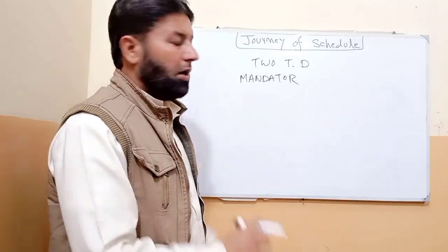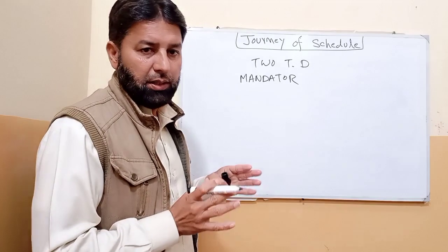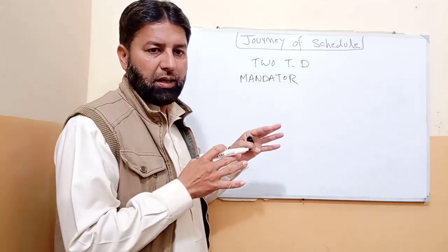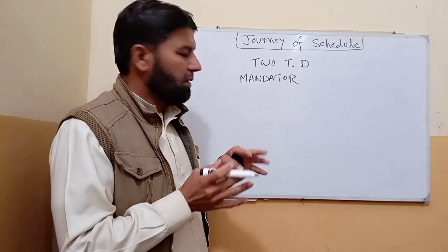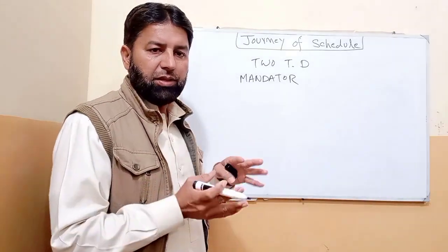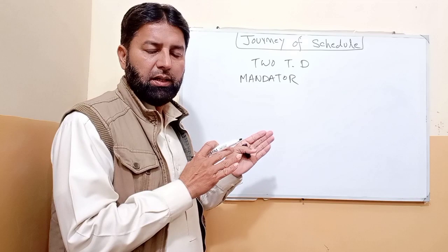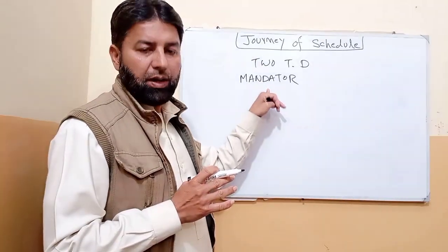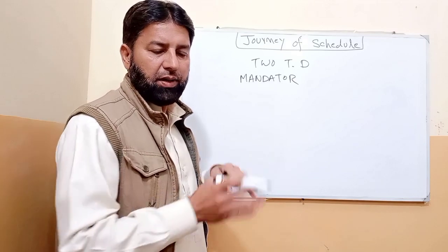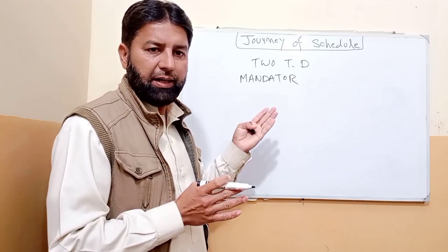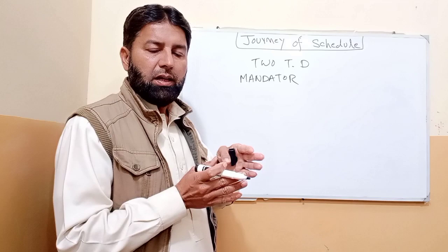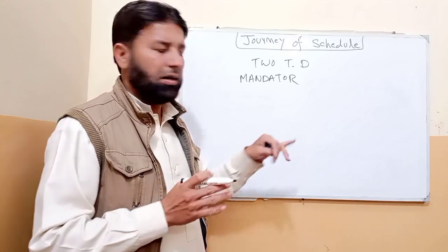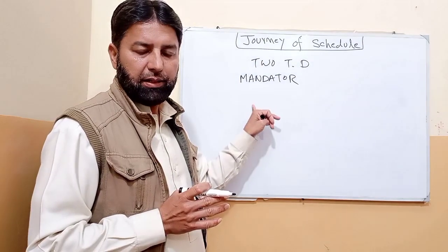Mandatory dependency is hard logic. It can be internal or external: inside the project, outside the project, inside the organization, outside the organization. We will take a work permit from the government and then start the work. That is external mandatory. And when we get a work permit from within the organization, that is called internal mandatory.